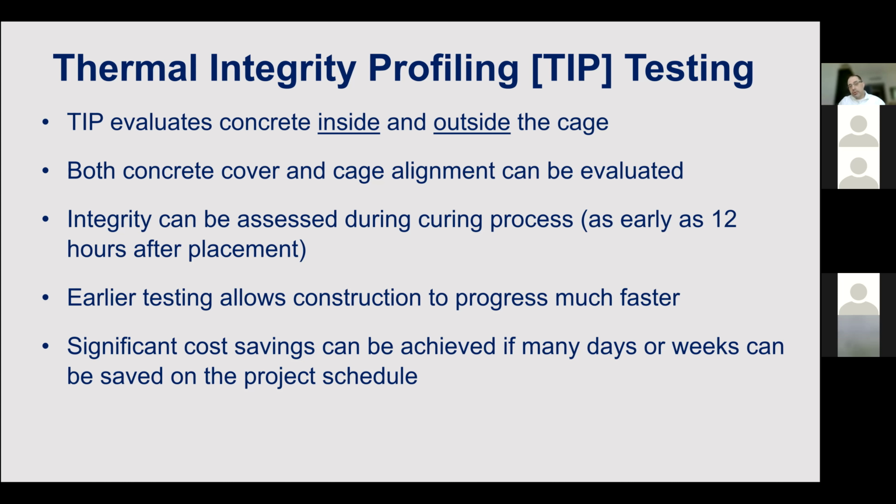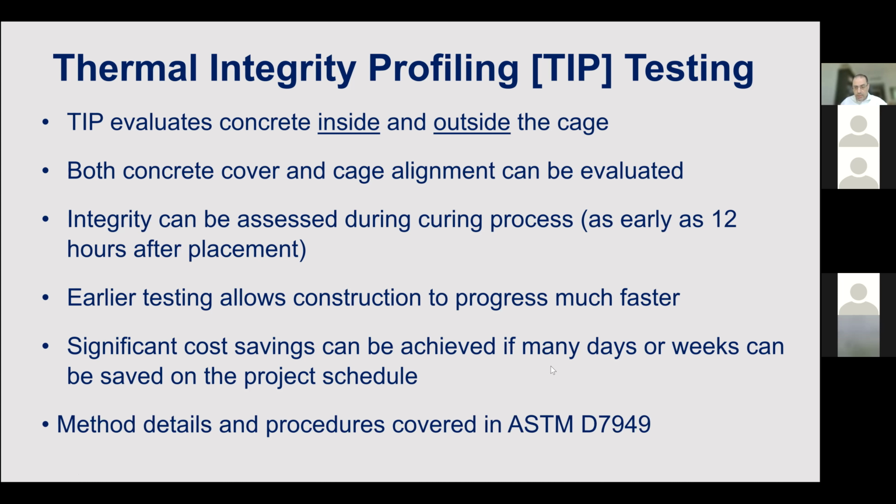Or at the end of the project or the foundation installation, it allows you to finish and get approval on the installed shafts faster compared to other methods. If, for example, you can shave several weeks from the program, construction time is very valuable. And this is something that the contractor and even the owner can appreciate if it gives an advantage to the project schedule. And again, like described, it's covered in ASTM 7949.